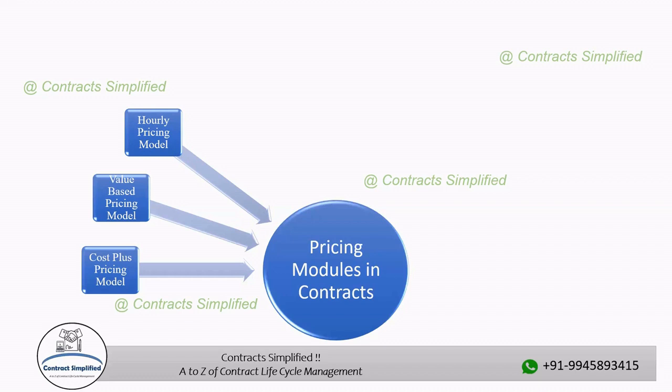This rate can vary widely depending on factors such as the skill level of the provider, the complexity of the task, the market demand for the service, and the provider's overhead costs. Before starting a project, the service provider typically provides an estimate of the number of hours it will take to complete the task. This helps the client understand the potential cost of the project based on the hourly rate.